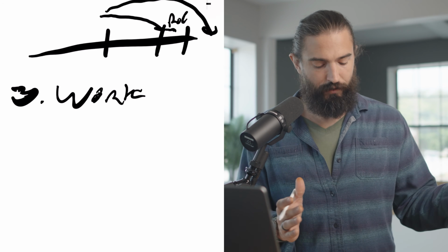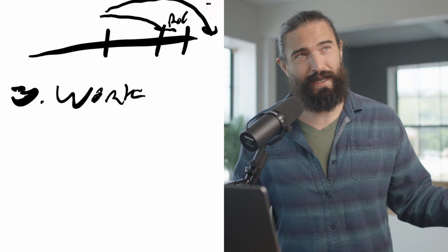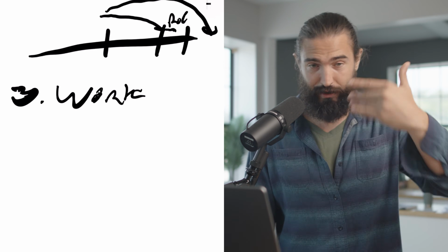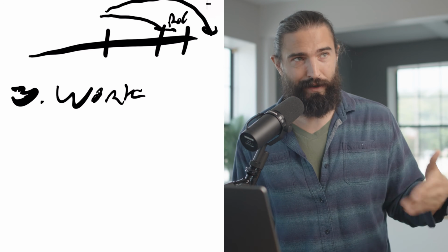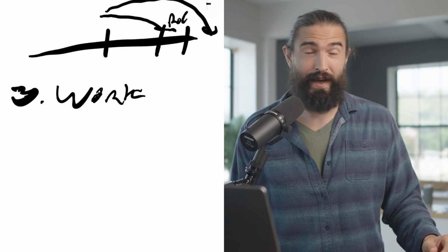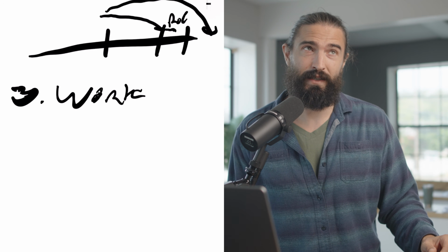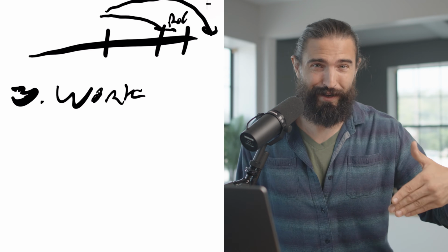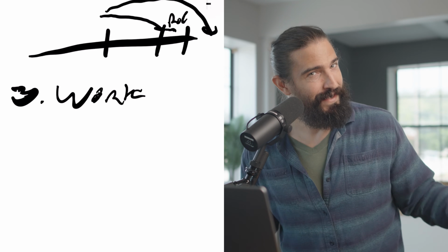All right, so first, these numbers, they come out of nowhere. Just think about the all-arounder types that we hire. This is what they're going to do. They're going to look at the amount of work. They're going to be thinking about, oh, how many days is that going to take? And then they're going to think, what do I got to pay the guys per day? And that's where they're going to come up with their number. But first, before they do all that, they're going to be thinking, what would this guy take as a bid?